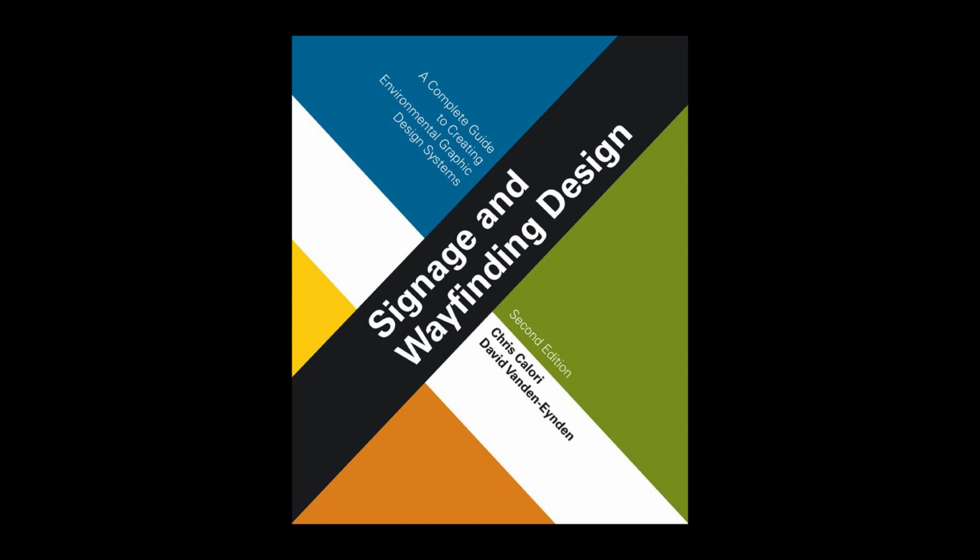Submittal review. Submittal review is the key role for the EG designer during Phase 6. As noted in the discussion of Phase 4, submittals are items the fabricator prepares to indicate how the sign program will be fabricated, and these items are submitted for the designer's review and approval. Submittals required for signage typically include shop drawings, artwork for all sign graphics, material/color/finish samples, product literature, and production prototypes. See figures 2.31 and 2.32.